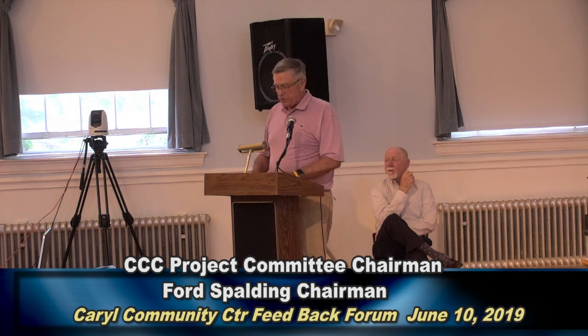On October 7th, you are going to give us the answer. This will take us to phase two, if we can go that way, where we would hire an owner's project manager, we'd hire an architect, and spend about a year going through schematic drawings, schematic plans, and coming up with pricing that would lead us to a final decision, which we would take to a town meeting. That town meeting would give us the design-build option, and we would then bond the 13 to 13.5 or whatever the number is. So that's really where we are.